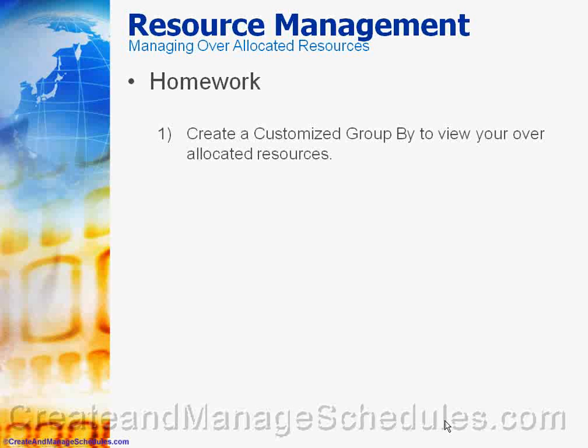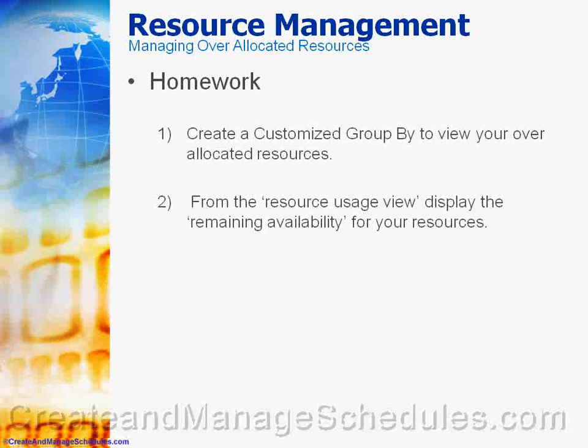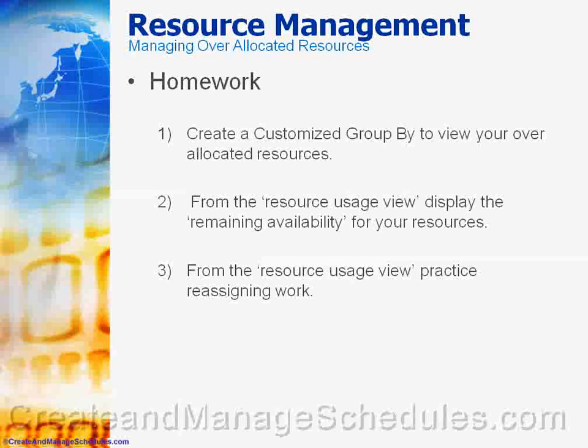What I want you to do is create a customized group to view your over-allocated resources. And then from the resource usage view, display the remaining availability of your resources. And finally, from the resource usage view, practice reassigning work. I want you to assign resources and remove work for over-allocated resources.